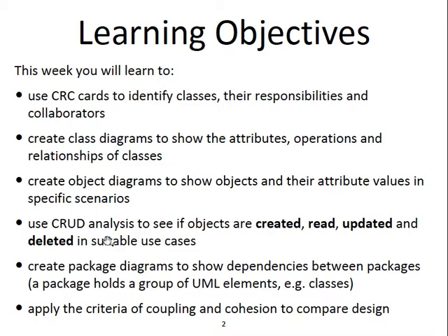CRUD analysis. CRUD stands for create, read, update, and delete. And I'll show you how to use this technique to help you make sure that you don't forget any important thing. In project management, one common problem is that we forgot about things that we need to do. So we fail to allocate time for doing that task. So that's how the projects go behind schedule, because we forgot about doing things.